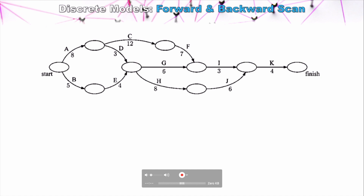Starting with the forward scan: beginning at the start node, we look at the earliest possible time we could start each task. Task A and Task B can be started at zero units of time — units may be days, weeks, or hours depending on context. As we move forward, to start Tasks C and D we need Task A to be completed. Task A takes eight units of time, so the earliest possible start time for Tasks C and D is eight units. We refer to this as the earliest start time.